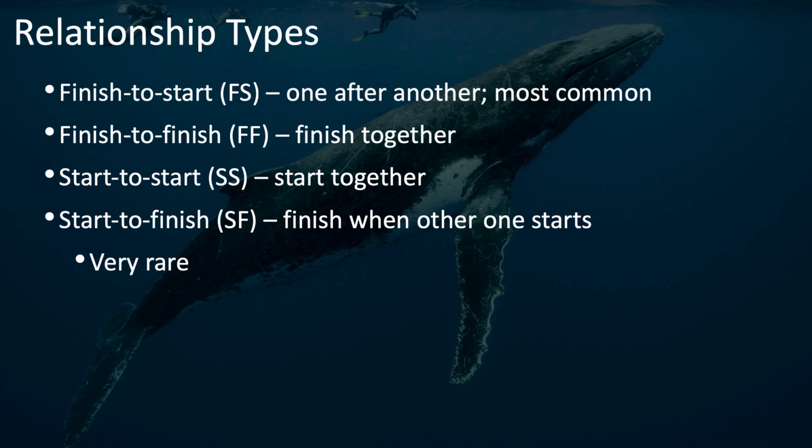To summarize, finish to start relationships are by far the most common. Occasionally you'll have activities that need to finish together or start together, in which case you can use the finish to finish or start to start relationship. And start to finish is very rare and perhaps not really needed, but included for completeness. The start to finish is a relationship that is so rare you may never see it, or you may find that it's much easier to capture these relationships in other ways, and you may only ever see it on an exam, and even then, it's pretty unlikely.